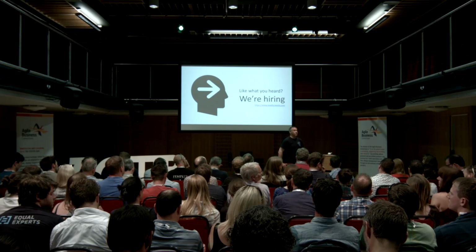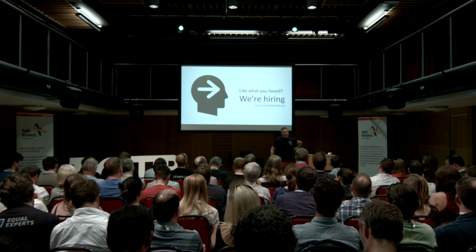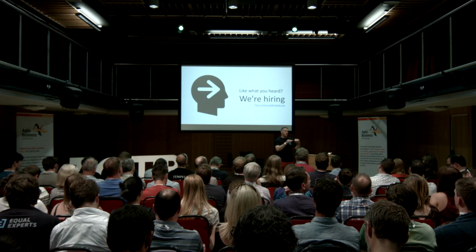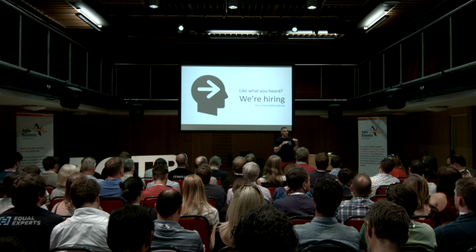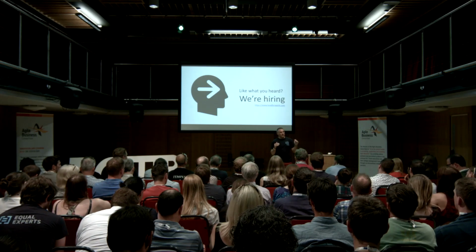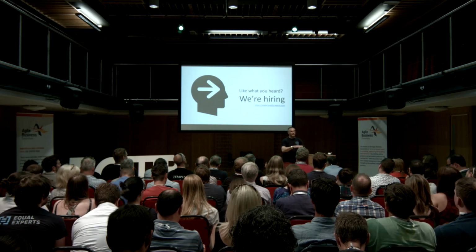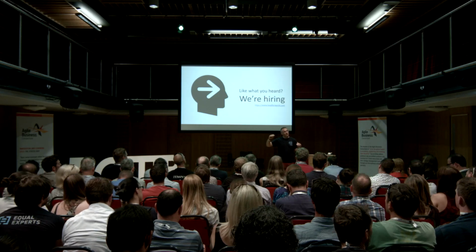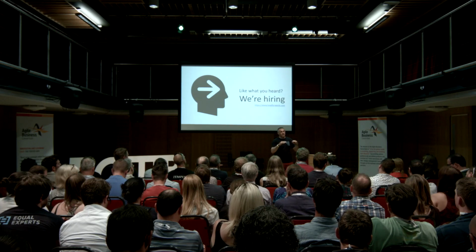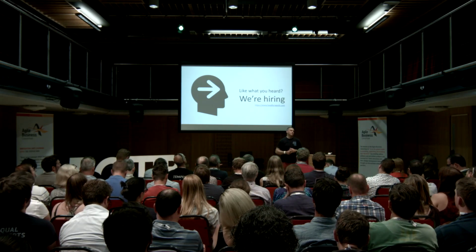So I'm using all the history. I think what you would probably do is you'd want to see if there was a really significant difference in how you're estimating from year 1 to year 2, or half year 1, half year 2. I think that's something you'd probably want to do anyway, just to make sure you're not, as a team, having inflation in how you're treating points. So if you've got a fairly consistent way of pointing, then I think there's no problem with going back right to the start to all the data you've got.